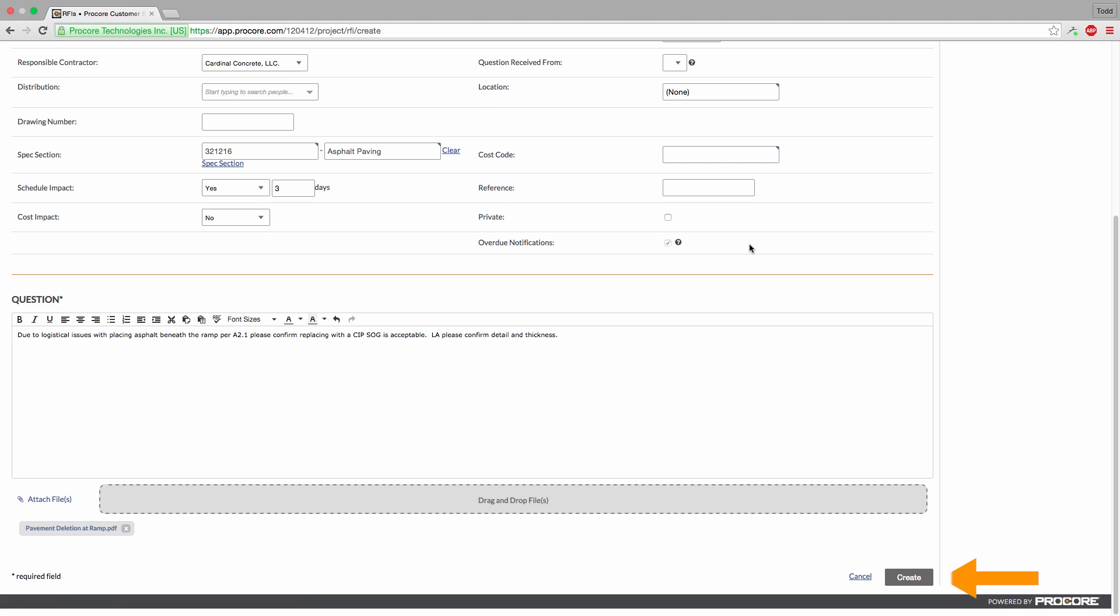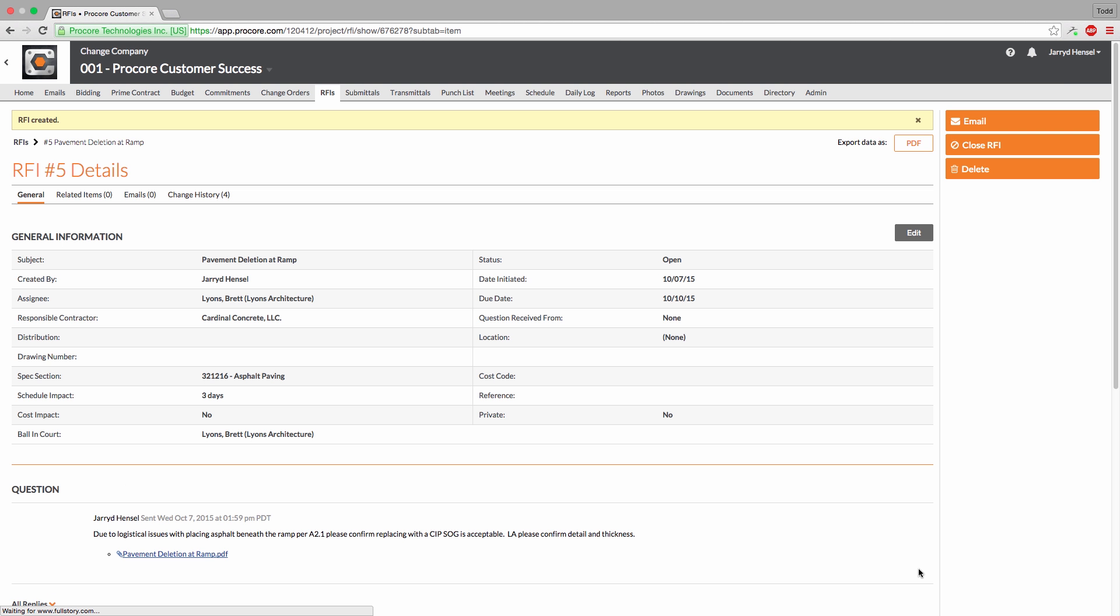Click Create and Procore will automatically send an email notification on your behalf to the assignee and distribution list, letting them know that an RFI has been created.